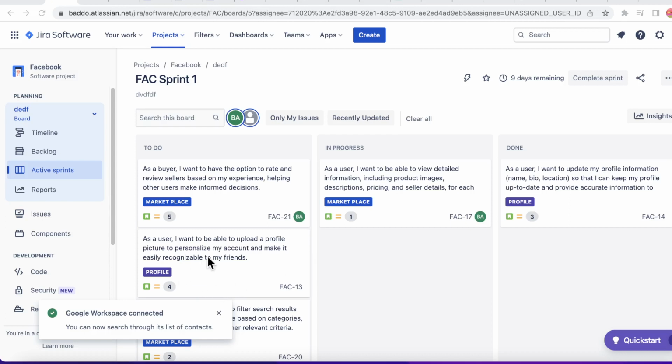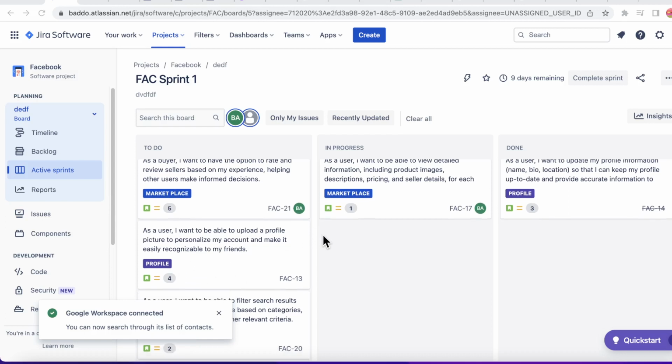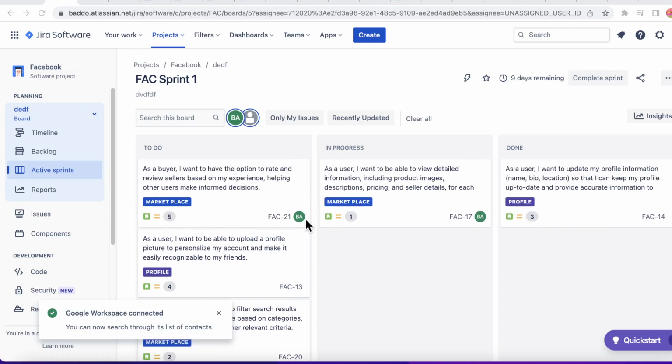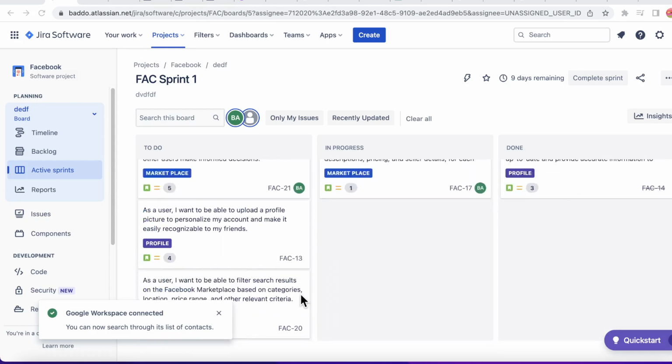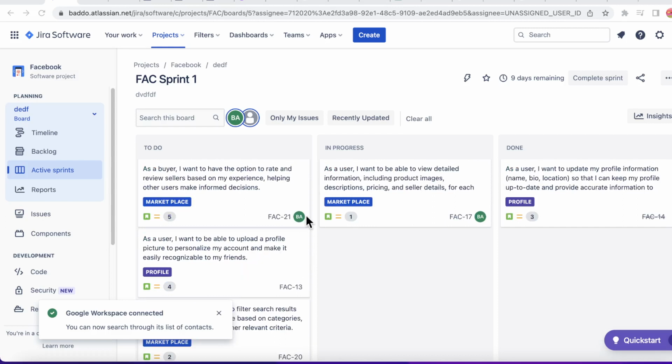One other thing is that during daily stand-up, we are not going into details of a person's work. If details are required, maybe somebody talks about an impediment and another developer can explain how the person can get out of that impediment, we don't do all these at daily stand-up. You schedule another meeting for these people so that they can handle that outside the daily stand-up.